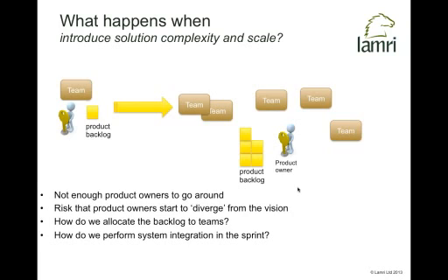And what about performing systems integration in the sprint? That's an interesting one, isn't it? Because an individual team integrates the stuff it's doing, but who actually gets to integrate the overall end-to-end system and pull all that together? Someone's got to worry about that, because clearly you've got to think in terms of your definition of done. Done often actually is: I've put the entire contents of the sprint into configuration management. I've built the entire system as it stands to date. I've tested it all, and I've regression tested up to date. And often deployed it on some sort of deployment or test box as well. So when you start to talk multi-teams, who gets to think about all that?